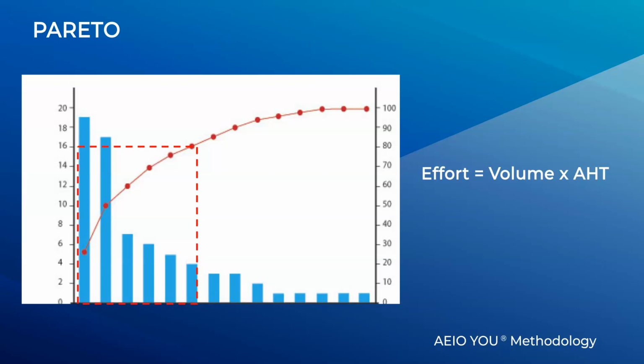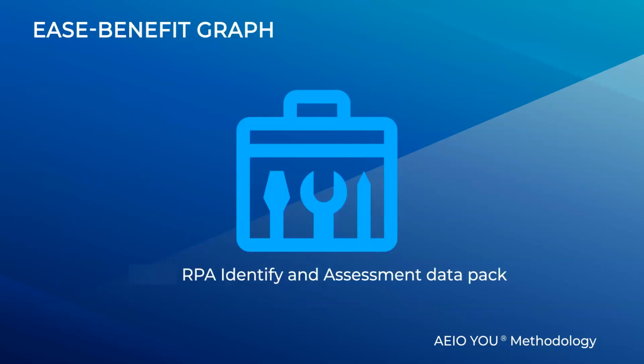Now we have a much shorter list, you can dive into the detail and start prioritizing in waves. By using the complexity matrix in the technical questionnaire included in your toolkit, work with the SMEs to start scoring and quantifying how complex a process would be to develop, looking at things like the number of screens, systems used, and how many steps and decision points are in each process. Also score and try to quantify the amount of financial and intangible benefit you get from automating these processes.